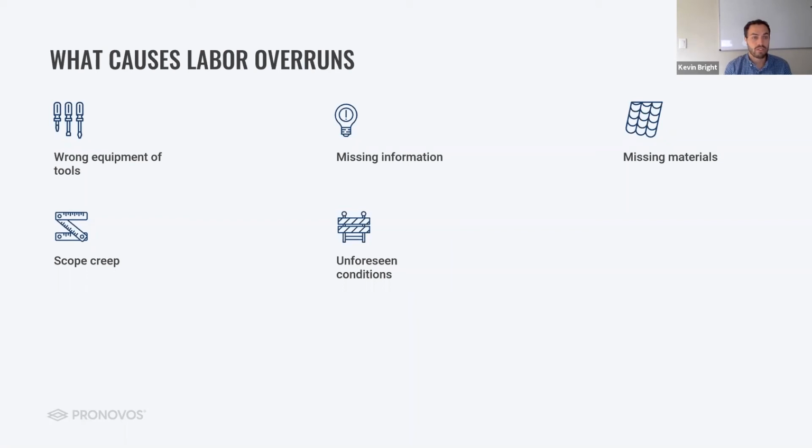Another project I was involved in early in my career was building landscaping for a project where you had the start of the site at the bottom of a hill and the rest of the site at the top of the hill. And we went about 20% over our overall labor budget over the course of the project. At the end of the project, we were digging into all the data, trying to figure out what happened. And what we ended up identifying was every morning, the guys had to walk about 45 minutes to bring all the equipment and tools from the bottom of the hill up to the top of the hill.